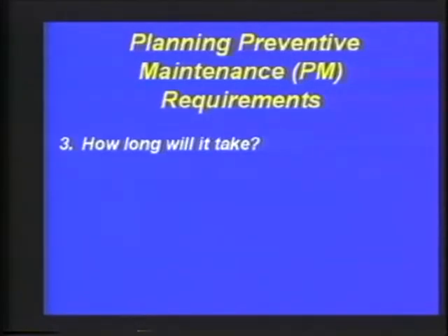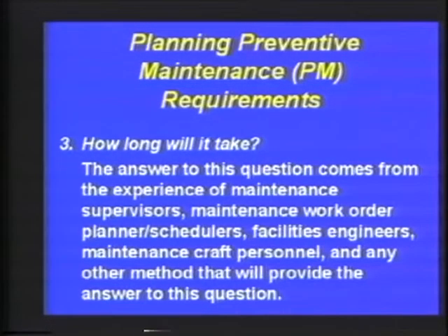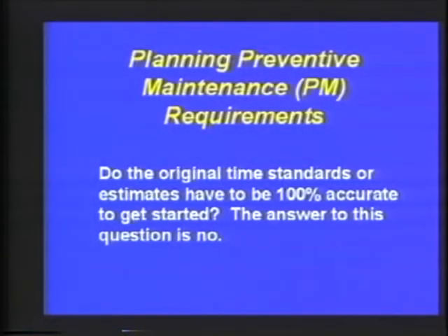How long will it take is predicated upon the actual functions within the PM and the minor or major activities. Now, there are no industrial engineered standards that I know of out in the marketplace relative to your particular maintenance requirements. There are publications, there are governmental publications, there are some MTM, method, time, motion study standards, but my experience indicates that the easiest way to implement PM and address the question, how long will it take, is to develop a detailed worksheet. And remember, we looked at a worksheet. We start off with the sequence number, the description, that is what has to be done in that sequence, and then we estimate the time.